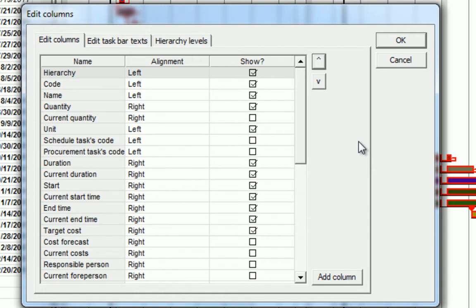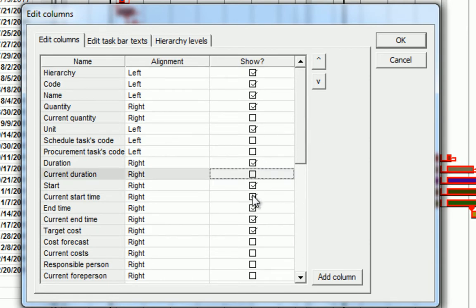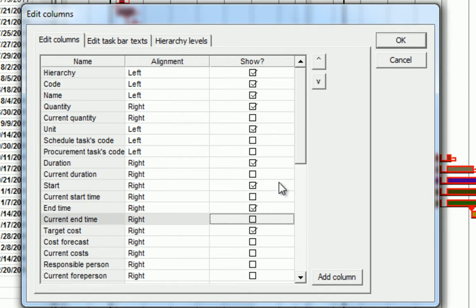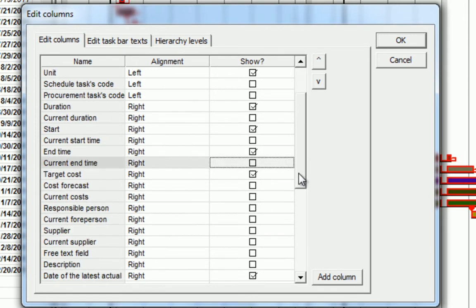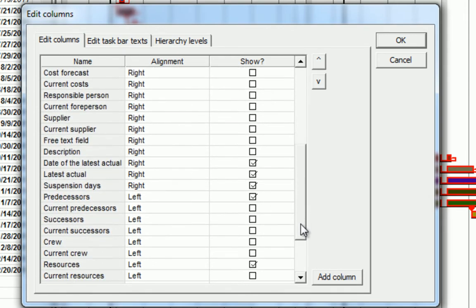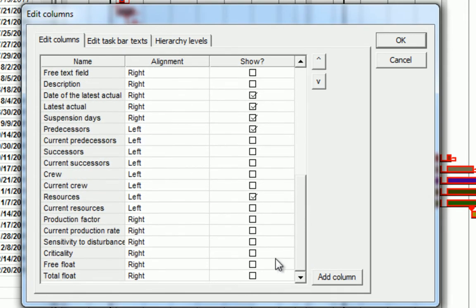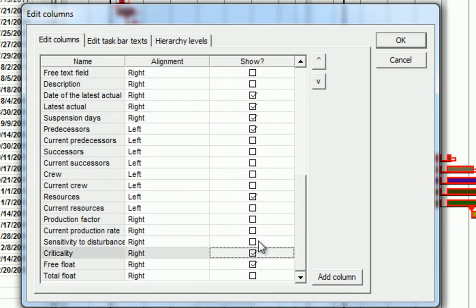Within this dialog, we have the opportunity to adjust exactly what we see and display in the Gantt Chart View. Let's start by unchecking the Current Duration and Current Start and Current End Time View settings. We can also check the Free Float and Criticality View Sets to add them into our Gantt Chart View.